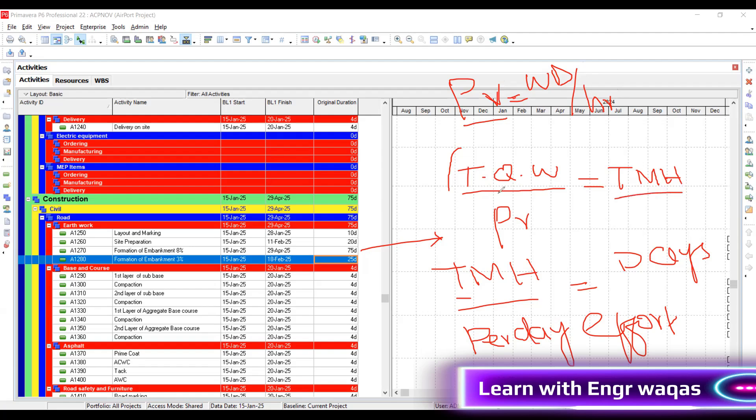Total man hours: total quantum of work, which is given in the BOQ, divided by productivity. Then how to conclude the days - convert total man hours into days. Total man hours divided by per day effort. Please let me know in the chat box. Is it clear?